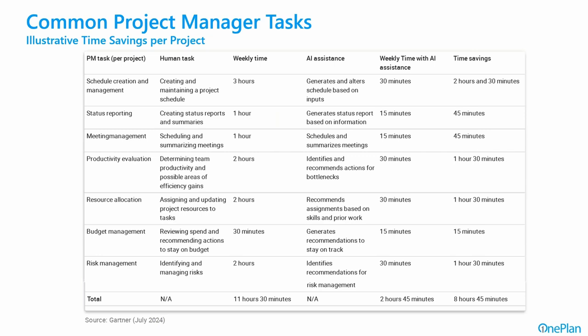The Gartner Group did a study on time savings per project moving forward that we can anticipate. For example, schedule creation and management with a typical weekly time of three hours could be reduced to 30 minutes — a savings of two and a half hours per week. These different areas aren't about removing roles, but changing them — taking more mundane administrative tasks, making us more efficient, and freeing us up for higher-value activities: more mentoring, optimization, maturing the organization, and providing more value rather than administrative work.